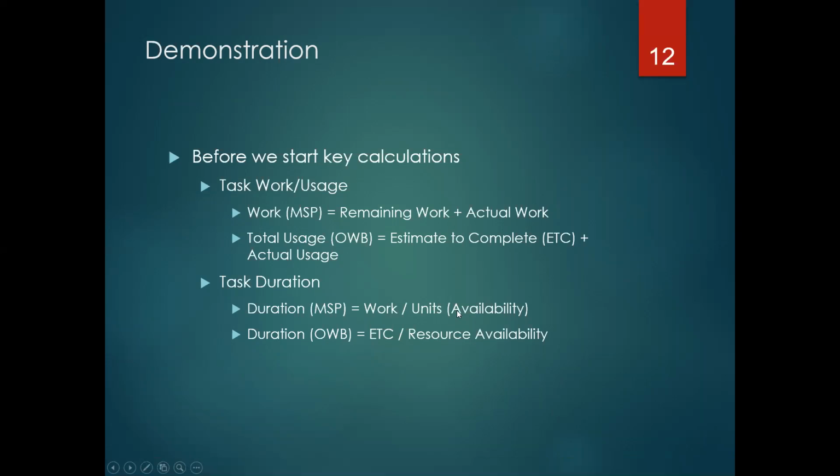That can be set at the assignment level within a task for each resource. That can get cumbersome. You can certainly do that, but you can also set for a resource the maximum availability, and it will apply that maximum availability, and we'll demonstrate how you do that. Then you can put the ETCs on, and if you've got AutoCalc on, it will drive a duration for that particular task.